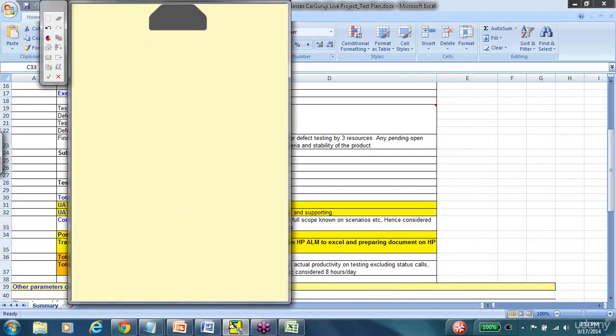Now, yesterday somebody was asking me, how can I tell that this much amount of time it will take for me to test, or how many steps can I come up with. The industry standard is, again, this is subject to change. Yesterday we wrote 2 test cases. If we are writing test cases of that nature, the standard is that one person can write 30 test cases per day, again depending on the complexity of the application, the number of test steps in there and all that.